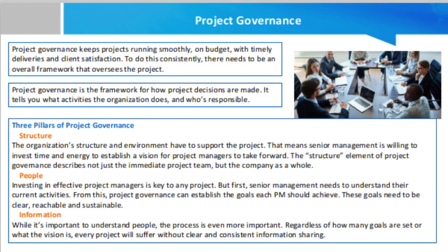Friend, the project governance model has to complement the organization. That's why the project manager needs to consider the amount of rigor to incorporate. When project governance is overzealous, it can annoy stakeholders. When the opposite is true and governance is too slack, there can be a lack of stakeholder engagement or the risk of false escalations. Use the project scope, timeline, complexity, risk, stakeholders, and their importance to the organization. With this, you can establish a baseline that contains all the key elements required for project governance.